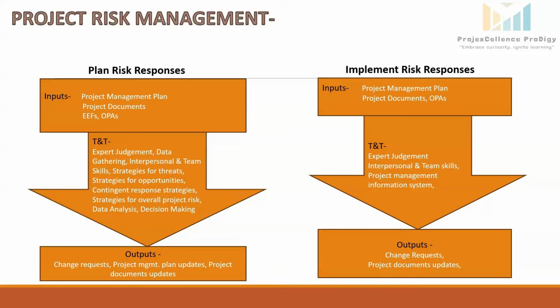Share, partner with a third party to leverage an opportunity. For example, partnering with a logistics company specializing in heavy equipment transport can help share the benefits of faster and safer delivery. Accept, take advantage of an opportunity if it happens, but do nothing proactively. For example, if a manufacturer offers a discount on bulk solar panel orders, we may accept it if it fits the budget, but we won't change plans to chase the discounts.